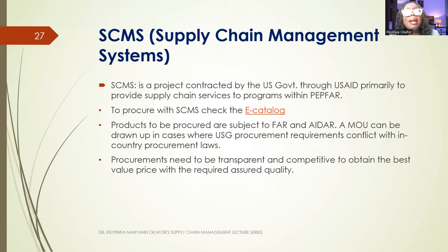We also have the Supply Chain Management System. It is a project contracted by the United States government through USAID, which is the United States Agency for International Development, primarily to provide supply chain services to programs within PEPFAR. To procure from the supply chain management system, check their online platform, that is the e-catalog. Products to be procured are subject to federal agency regulation, the Federal Acquisition Regulation, and the USAID Acquisition Regulation.